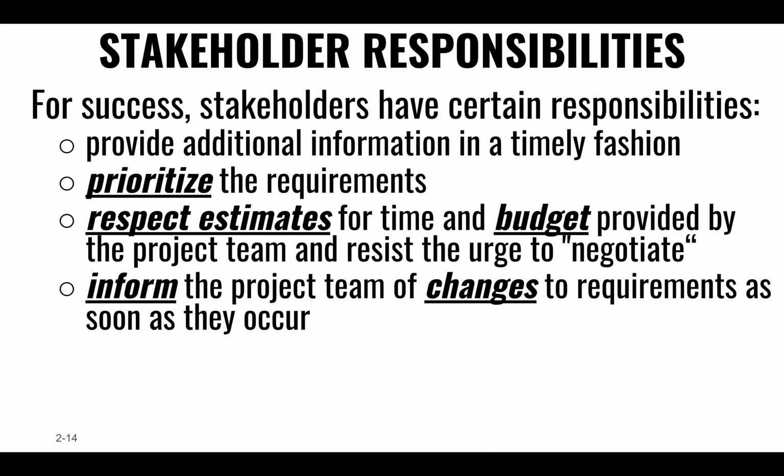Because they have a particular time frame that they want this by, usually certain requirements will have some relative importance compared to other requirements. If you leave it to the stakeholders, everything's important. Everything's extremely important, okay? And that's impossible. We have to be able to identify what we are going to start working on first. Just in case we run out of budget, at least you'll have something at the end, some core functionality. So what should that be?